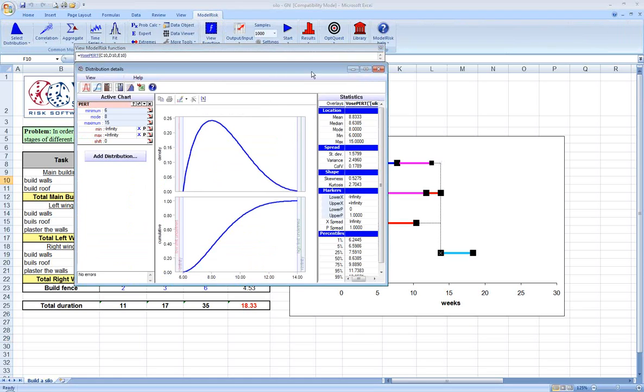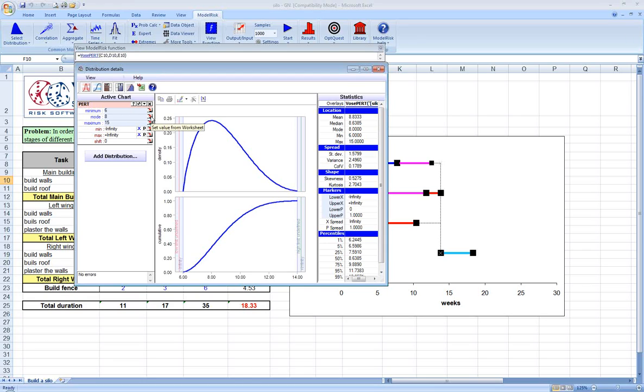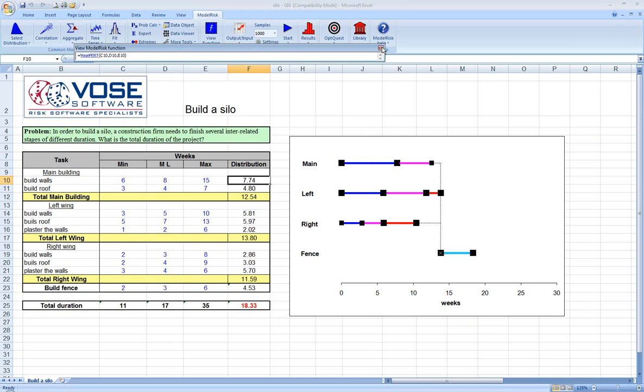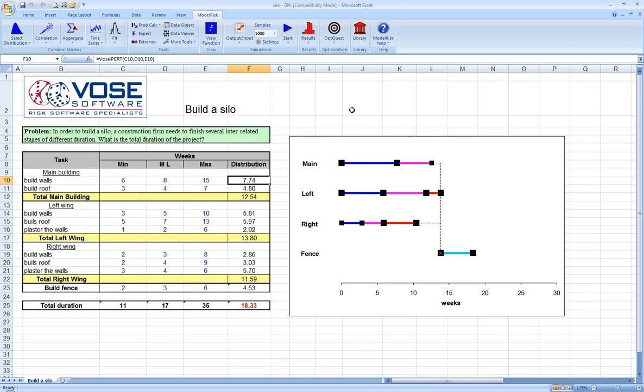We can show an example of the PERT distribution for building walls in the main building. The PERT distribution is used because it can be completely specified using a minimum, a most likely or mode, and a maximum. In our case, we're doing that for all of our estimates.